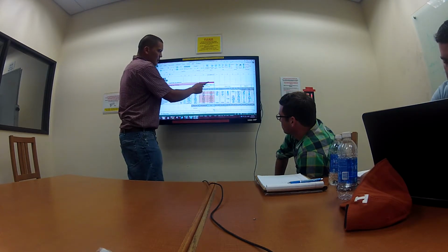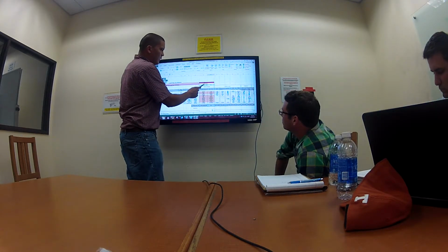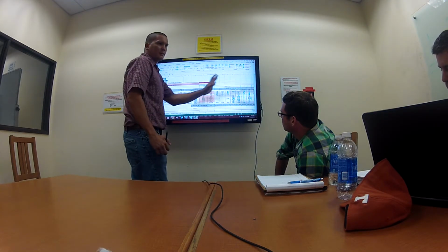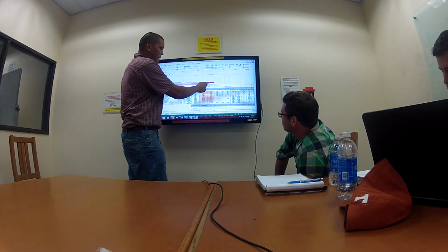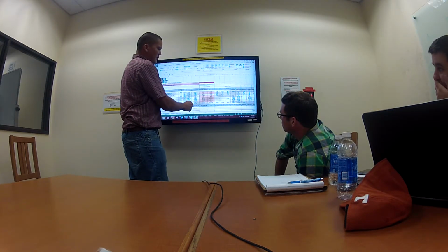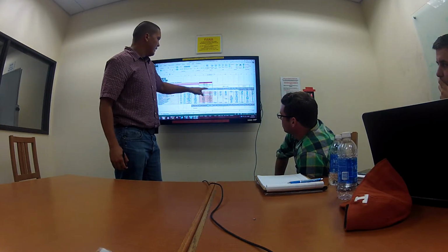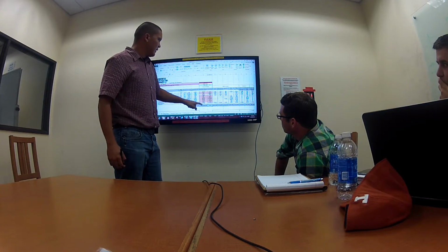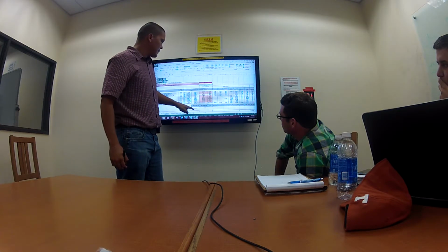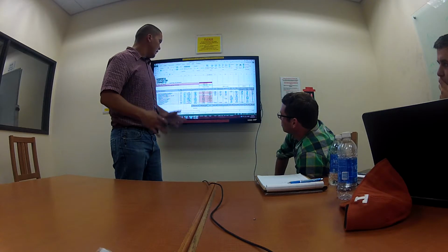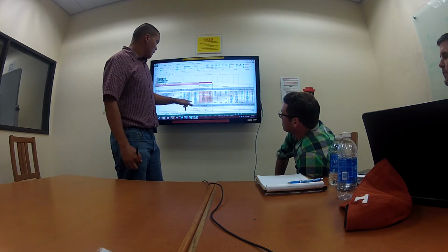So usually what these ones up here are, this is our target total, which would be this number 157, and that's our target total based on all the direct costs and the plug numbers that we have in there. This one would equal this right here. And then our bid total would be the extended amount right here, and this is the differential between them. They would say, all right, you're $59,000 under where it needs to bid. You need to start adjusting some other items to make them work. And this is the sheet where you're going to be able to see it.